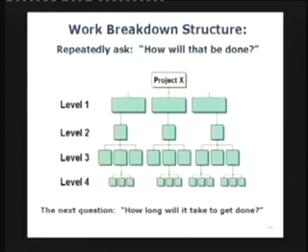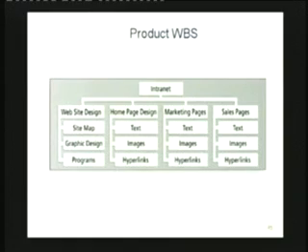I'm pretty sure if I sat with you, if you're discussing ERP software with me, if I ask the questions, you'll be able to identify the modules right at the end. You'll be able to say, these are the modules, sir. We've got to build them together. And this is the beginning of sequencing the thing, because not all these things can be done all at once. But they are all independent. The dependency is only vertical. And wherever they interface, that's when the units are coming together to make a subsystem or probably a whole system.